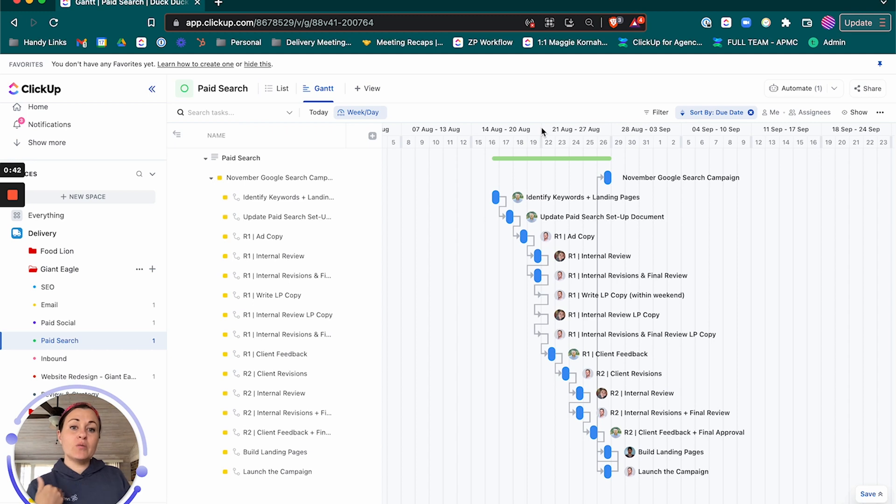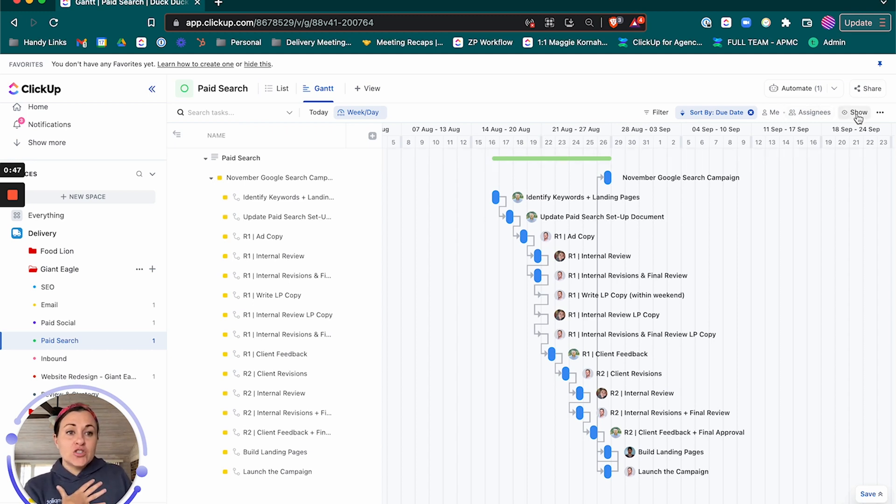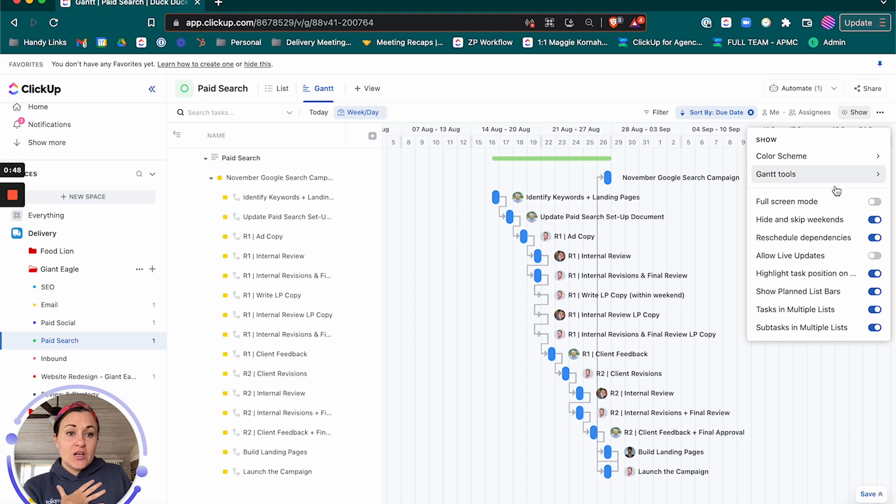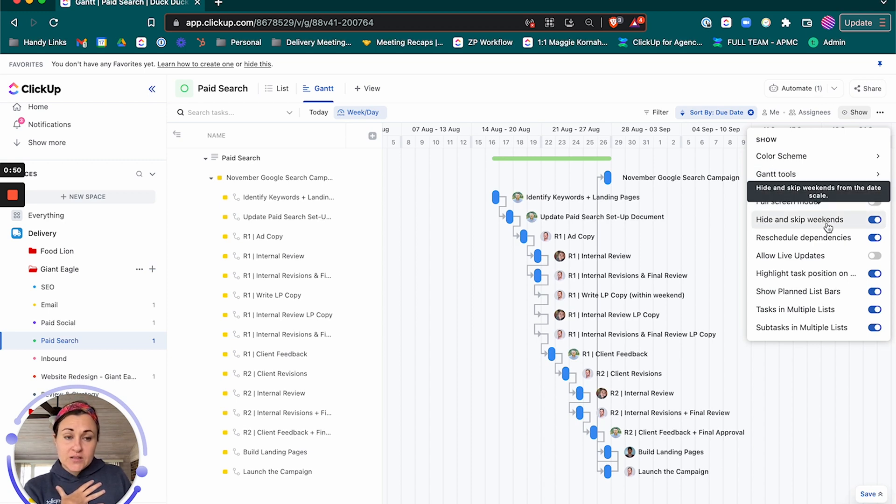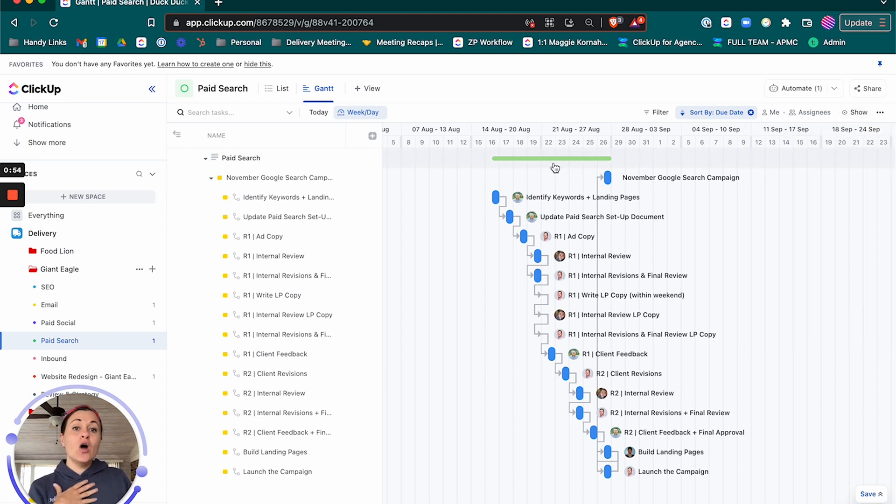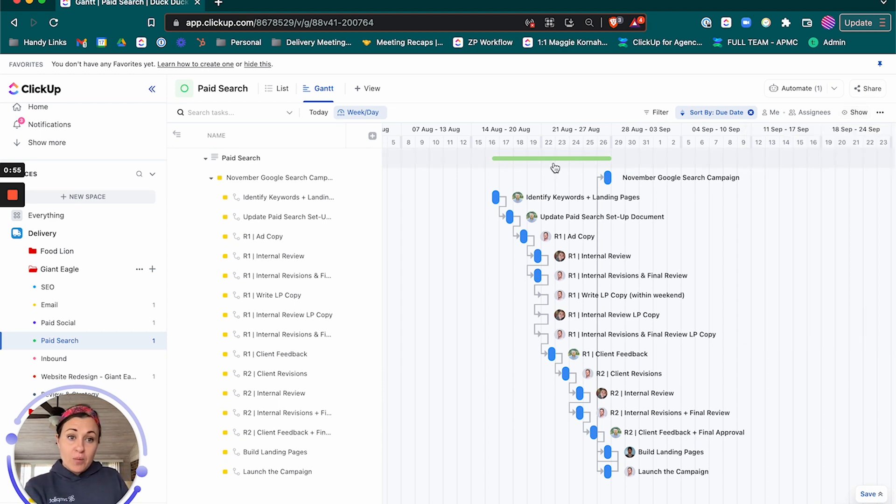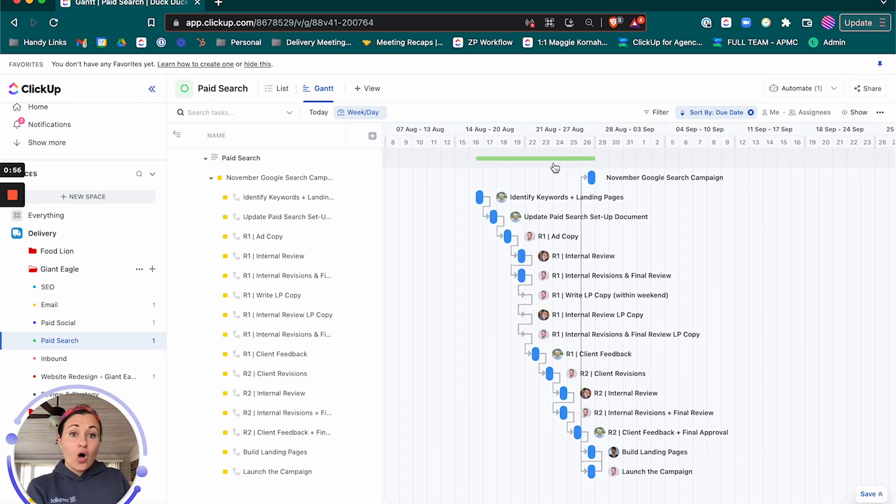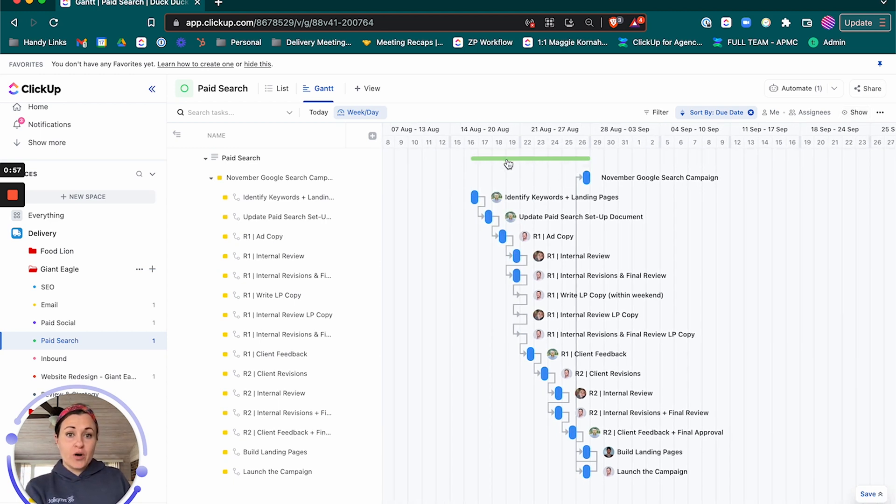So I want to make sure that we shift everything to fall on a weekday and we're going to do that by making sure hide and skip weekends is on as well as reschedule dependencies. And so we're going to jump this all the way to November.